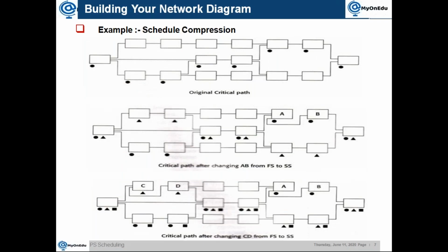The critical path method is what we normally talk about in project scheduling. This is what happens when you connect them. When you give the dependencies for all the activities and connect them together, then when you do a scheduling, not only in SAP but in any system, it will be able to give you the critical path. This critical path, for example, what you are seeing, is a dotted line.